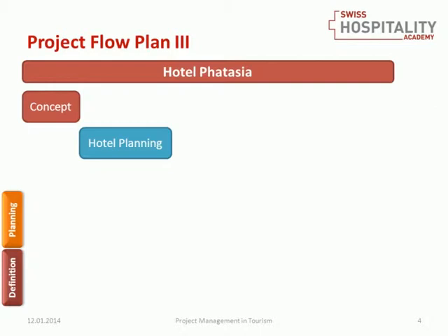We have to look for a plot. We have to make blueprints. We have to apply for construction permission, and that's the next step. If this is done properly, we can work on the construction.